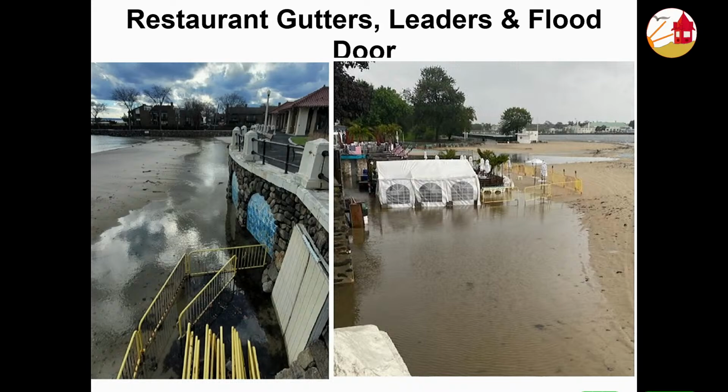On the back of the Barley House, we have a flat roof, and there's a gutter there that will empty into the new gutters that we're installing. We're going to install larger gutters, and then we're going to take that water on the park side, on the promenade side, and underground it. We have 2 leaders that we're going to take down, and then just bring it to daylight over by, where is that? Where the drain is?